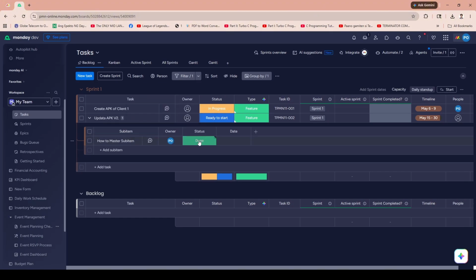that particular item. The next step involves deciding which column from these subitems you want to roll up to the parent level. This is a crucial decision, as it determines what summary data will appear at the parent level. It could be the status, due date, or any other metric you are keen on tracking for better oversight. Carefully consider which column provides the most valuable insight for your needs.